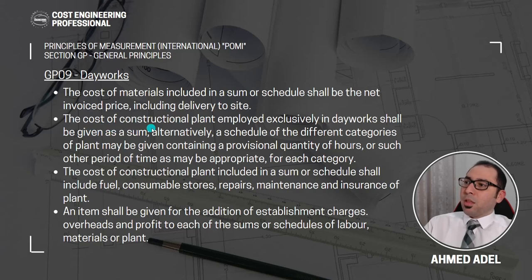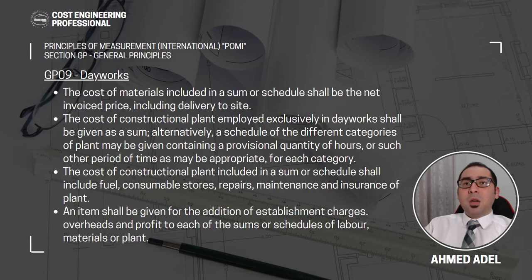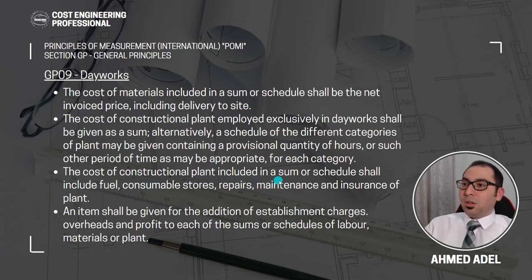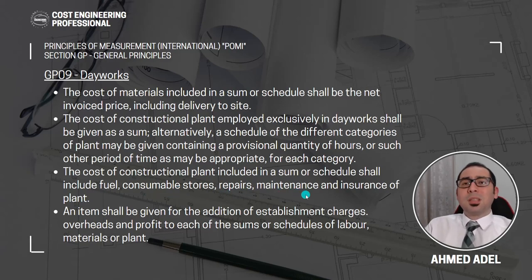The cost of constructional plant employed exclusively in day works shall be given as a sum. Alternatively, a schedule of different categories of plant may be given containing a provisional quantity of hours or other appropriate period for each category. For example, for scaffolding you could put the hire rate for a given square meterage per month. The cost of constructional plant in a sum or schedule shall include fuel, consumable stores, repairs, maintenance, and insurance of plant.